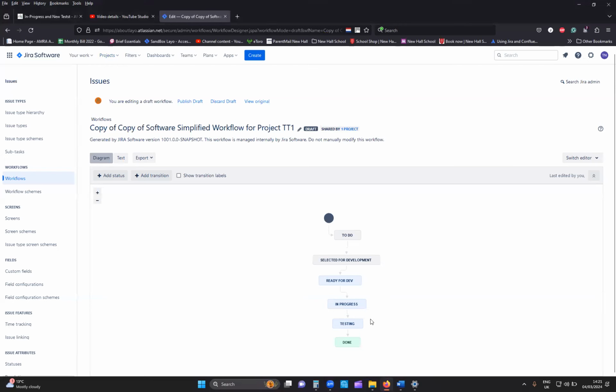So right now, you usually add your resolution to your done statuses, but in some situations, you can have specific resolutions defined for specific transitions. Say, for example, you're in the testing team, and in your team, before you can transition to testing complete, certain information must be populated or given to the team before they can complete and say testing is done. So you might want to put a resolution screen that is specially defined for that purpose onto that transition, and then have a separate resolution screen for your done.